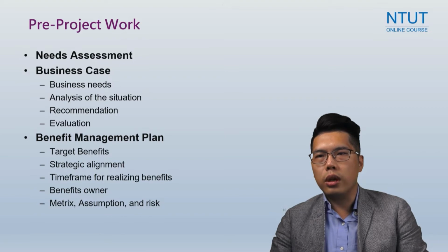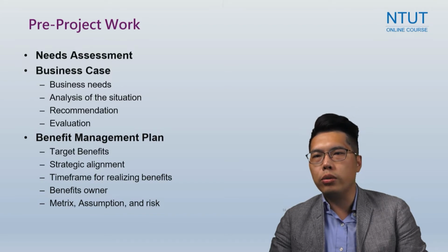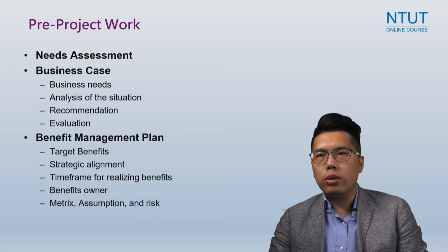So in the business case, a few items have to be clarified. They are the business needs, the analysis of the situation, and some recommendation of the stakeholders, and to think about how to evaluate the project. The third thing to do in the pre-project work is the benefit management plan.